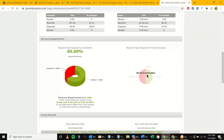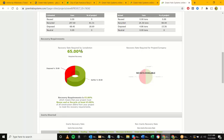One thing to highlight: if you recall at the beginning we could set the target diversion rate higher. If the project was targeting LEED or another requirement, you would see the specific rate right here — for example, if set to 75% it would say 'The recovery rate required for this project is 75%' even though the jurisdictional CalGreen requirement is only 65%.